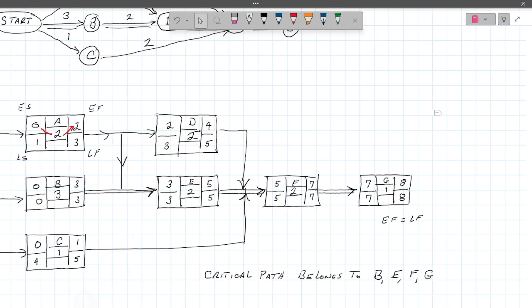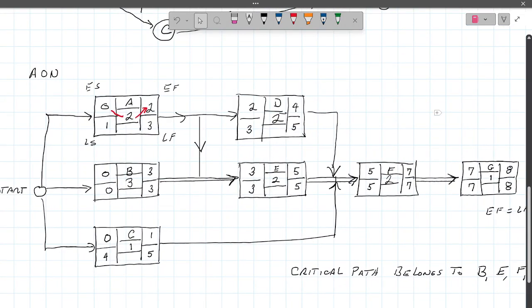So if we go back and take a look at C for a minute, the other telltale sign of this is because C goes all the way out and doesn't have any following activities until we get to F, you kind of expect to have some wiggle room here. I can actually start C at week 4 because I don't need a week to do it. And it's going to get done before I start F because the other two activities are taking 5 and 4 weeks. But I can look at D and I got a week there that I can play with. So that gives me a week to early start or late start if I want to.